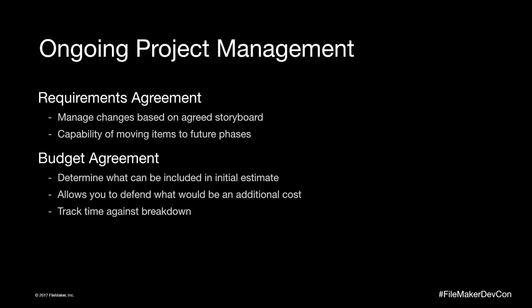Okay, and then how does that help with ongoing project management? Well, you've got a visual. This is what I'm going to deliver to you. If the client comes back and says, I really needed to do this and it's an additional 30 hours, you basically can defend the estimate getting higher, or maybe, hey, what's more important? We can pull this part out of it and put this part in there or whatever. You have the paperwork to back you up.